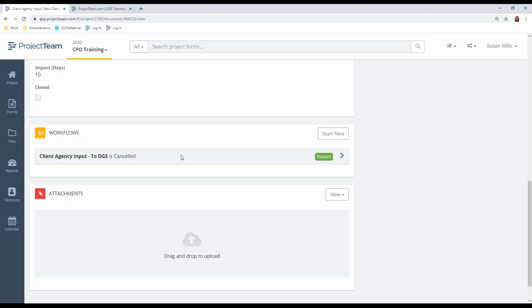You get the request over, you approve the drawings or you approve the finishes, you would select approved in the action. But this is also for you as a client to be able to say, hey, I see something I want, or I'd like to change something, or I've identified some additional funding that I'd like to apply to this project. I'd like you to add this scope. So this becomes that official request over to DGS to do something on the project, where DGS can have a tracked response back to you, and there's an official documentation of the whole process.